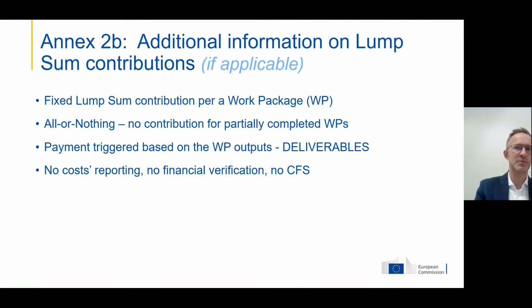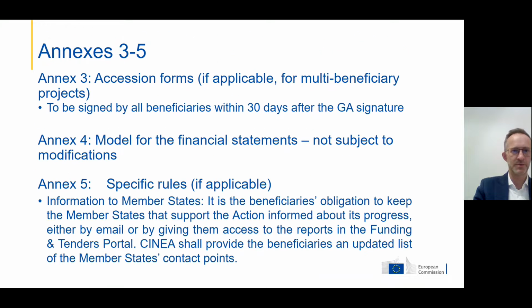Another way, if it's applicable to you, are the lump sum contributions. These are fixed amounts which we pay. Again, no cost reporting, no financial verification, no audit reports, and either you do everything and you receive our grant or you will not receive it at all. There is no contribution for partially completed work packages. And again, please keep in mind that we always want to see your deliverables.